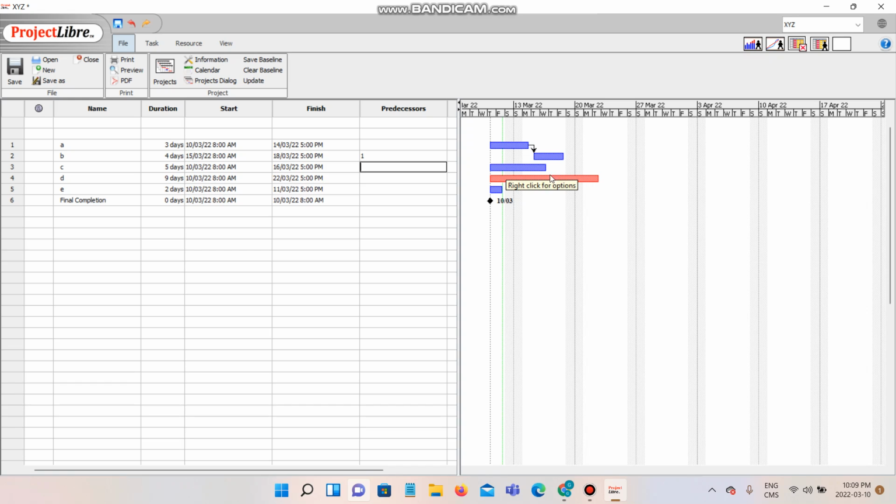The other way of doing this is to just drag this to the next level dependency activity. We're gonna see that the same activity is done here. See, there is a link between activity B and activity C, and we can see the serial number of task B appears here automatically. So to complete our Gantt chart, just simply drag them to the next activity.